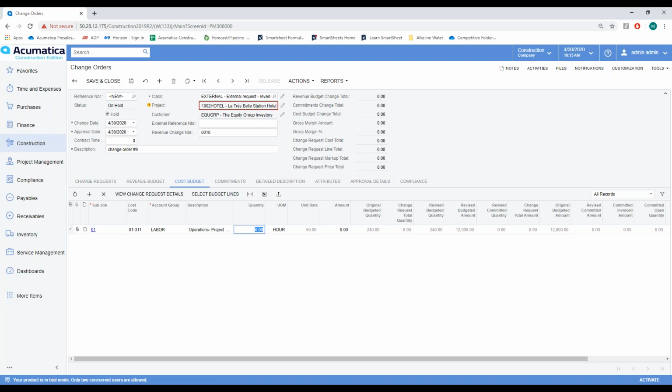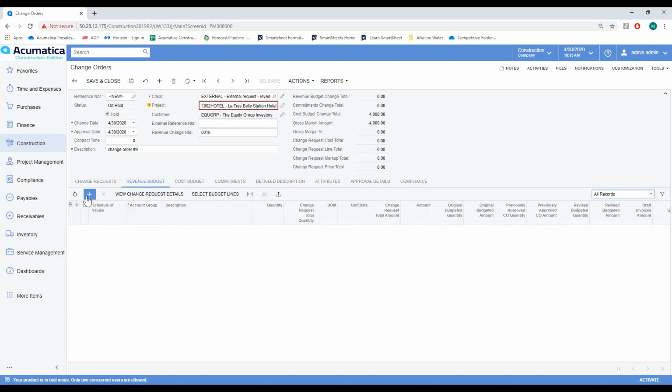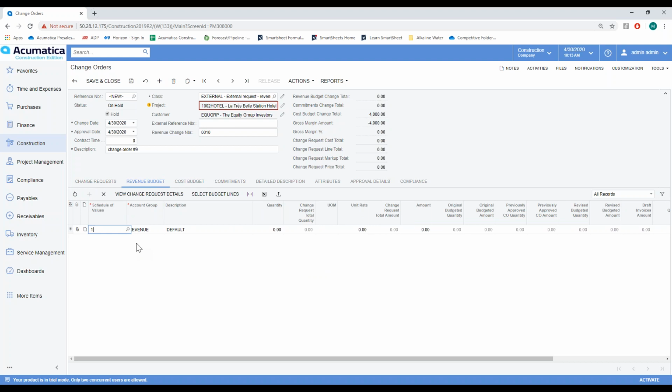We were close to 90%. I think what we probably need to do is give myself at least 2 more weeks to manage this full time. Okay, so we can go ahead and do that. Now I'm going to hop over to the revenue budget, and I'm going to increase the revenue so that we end up getting paid for what we're doing here with the additional project management.